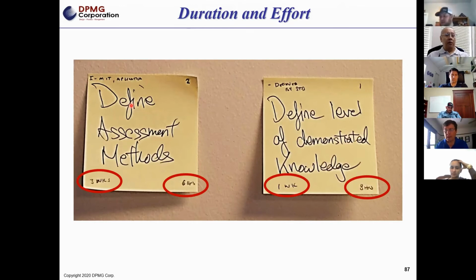Their involvement was to review the document that was standard for other software to see how it could be used for the implementation of their SPC software. It required the hardware guy to look at it from the hardware perspective and say, red line, change this, change that. And the application guy, the software guy, internally to say, here are the things we need to change. That's why it was only 6 hours. It was just a review of their normal standard implementation process, changed specifically for this particular software. But this was internal.